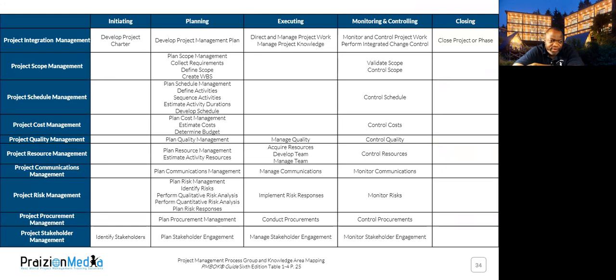You go through all of those steps, and then we move into the aspect of planning cost management. There was a question of how you're going to manage cost. And the general consensus was to do things as high level as possible, not to go too crazy in the estimate. So we had some high level estimates, but you got to remember that the estimates were actually based on our resource estimates. Because based on the resources assigned to the project, after you've planned how to manage resources, right? After the resources have been estimated, you then have to crunch down some numbers.